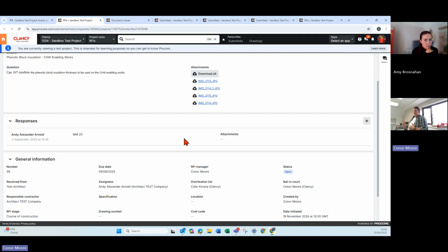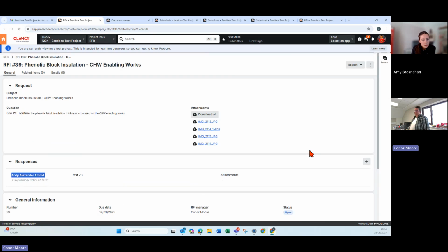And then if somebody on the Clancy end wasn't satisfied with the answer, they have the ability to ask more questions back as well. They can respond to your response and so on. And that's why you'll see the term ball in court. So it's now moved back to me. I was just signed in as the guy called Andy. That's why it's under Andy's name. I've now done my part. I've answered the question. I've confirmed yes, whatever it is, the installation, whatever it is. And if he's happy with it, he will then close it on his end.